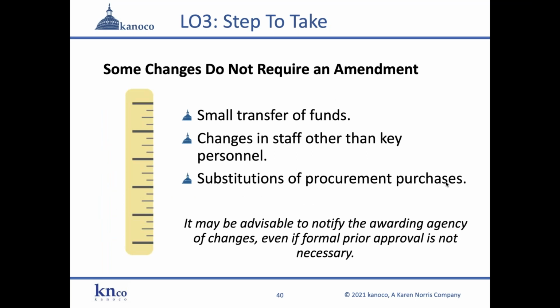Some changes that do not require an amendment are, as we said, a small transfer of funds, maybe a change in staff other than key personnel, maybe some substitution of a procurement purchase. It may be advisable to notify the awarding agency of changes, even if formal prior approval is not necessary, just to make sure, because you want to protect yourself from an audit disallowance.